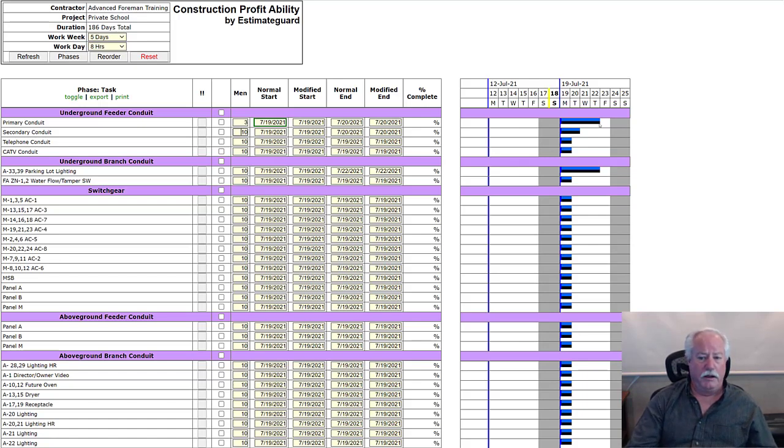What I'm telling you is you can fuss this a little bit through manpower, but at some point you're going to have more manpower working on that task than you can efficiently use. And if they're not being efficient, they're wasting money, right? Sometimes we get pushed into that corner if we need to make up time on a project.